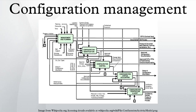Configuration verification and audit: an independent review of hardware and software for the purpose of assessing compliance with established performance requirements, commercial and appropriate military standards, and functional, allocated, and product baselines. Configuration audits verify the system and subsystem configuration documentation complies with their functional and physical performance characteristics before acceptance into an architectural baseline.